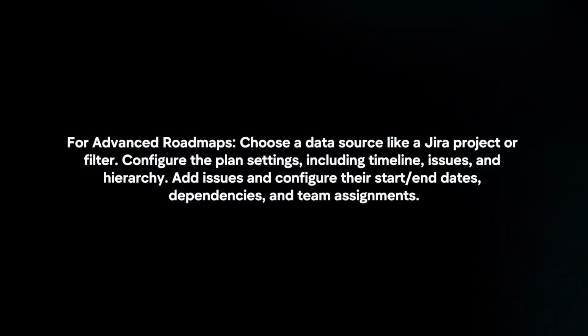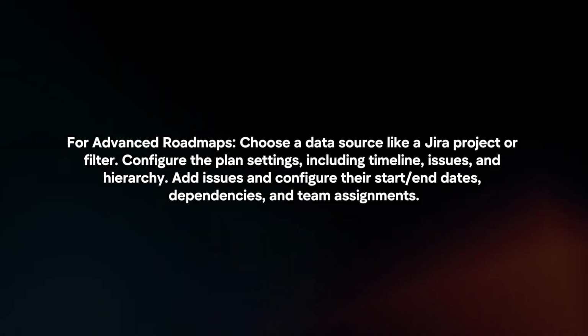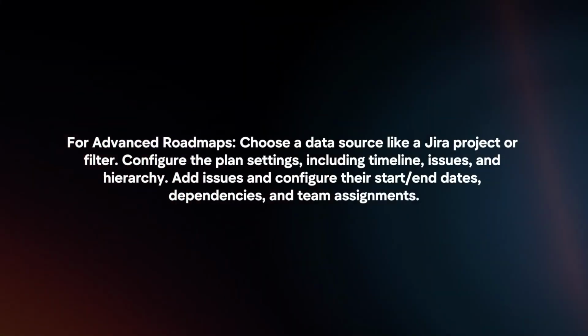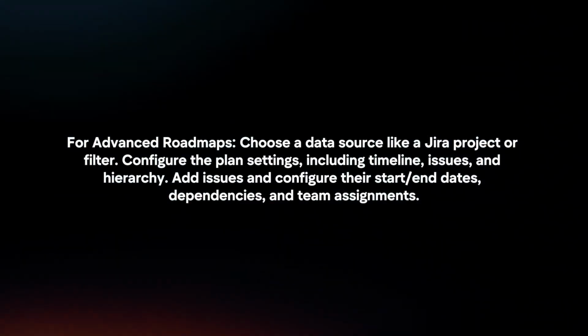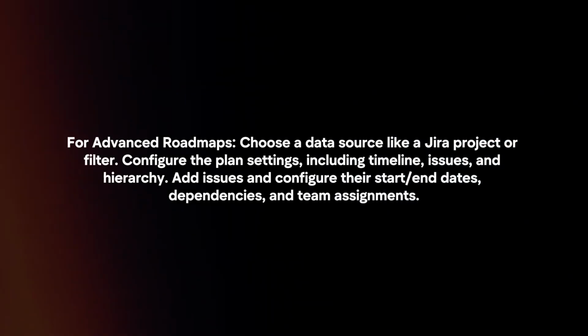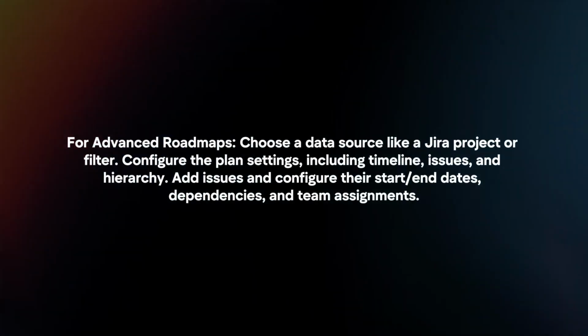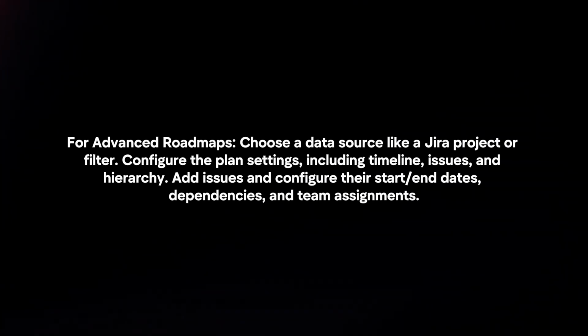For advanced roadmaps, choose a data source like a Jira project or filter. Configure the plan settings, including timeline, issues, and hierarchy. Add issues and configure their start and end dates, dependencies, and team assignments.